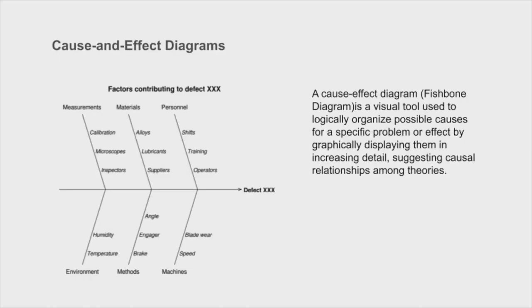First, we have cause and effect diagrams, or fishbone diagrams they're called because it looks like a fishbone. And essentially, it's a really simple process of saying what are some of the potential causes of problems for a product. Okay? So if we look at this here, for example, you'll see that we have the product is the middle line. And let's assume that there's some degree of defect. We've got to ask ourselves, what could potentially cause the defect?